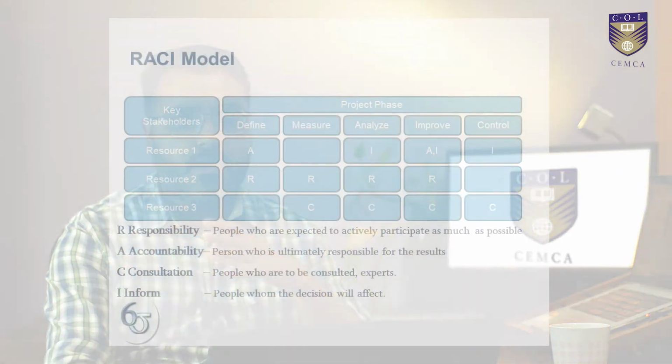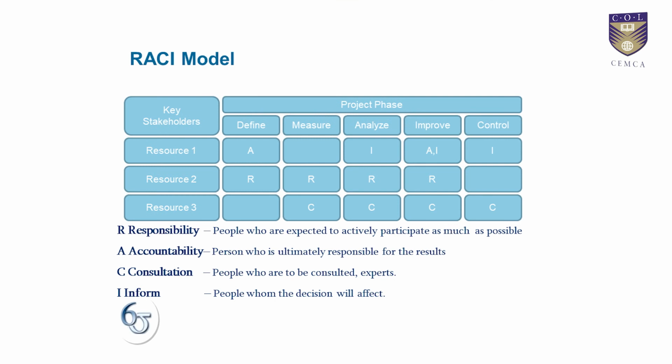the milestones. The milestones, when we are talking here, as you can see in these slides, the key milestones in a typical project or in a project charter, we'll talk about the key deliverables. In Six Sigma parlance, there are 5 phases: define, measure, analyze, improve, control. You can have those phases also as milestones, like when will the define phase get over, when will the measure phase get over.